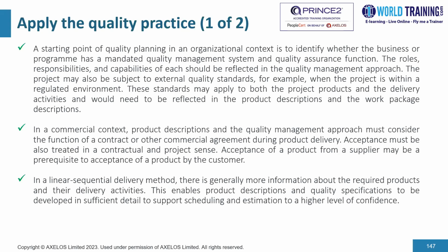Now, the roles, responsibilities, and capabilities of each should be reflected in the quality management approach. The project may also be subject to external quality standards. For example, when the project is within a regulated environment, and these standards may apply to both the products and the delivery activities and would need to be reflected in the product descriptions and the work package descriptions.